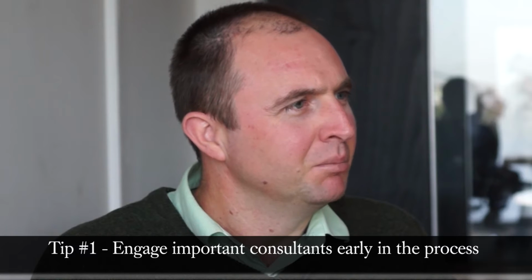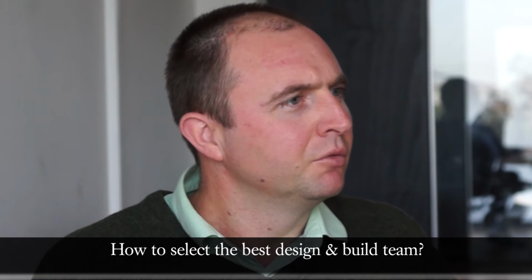Back to Justin and the building stage, what would be the number one tip for property developers at that stage? Building is obviously a very important and very costly part of developing, one of the big pieces of the puzzle. One of the great tips I've picked up from the podcast is engaging important consultants early, like a quantity surveyor and a valuer, when you're in the very early stages of putting together your feasibility numbers or getting ready to apply for a construction loan, because these consultants will really help make your application seem very bankable to the bank. And if you choose the right consultants, people that are perhaps already on the panel for a big group of lenders, you'll already be ahead of the process in terms of getting ready to apply for a construction loan.